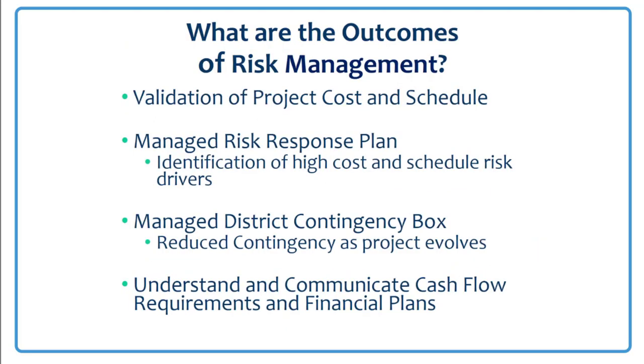Okay, so what are the outcomes of risk management? Validation of project cost and schedule, a managed risk response plan, which includes the high cost and schedule risk drivers, a managed contingency box with excess funds from risk mitigation going back into the program for additional projects, and also a better understanding and being able to communicate cash flow requirements and financial plans.